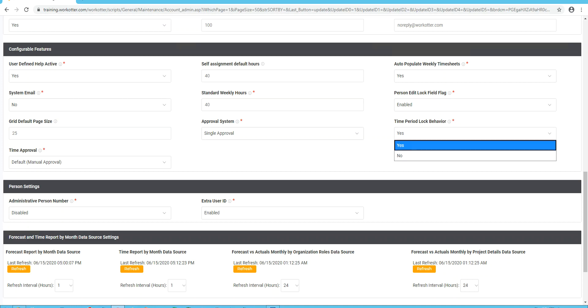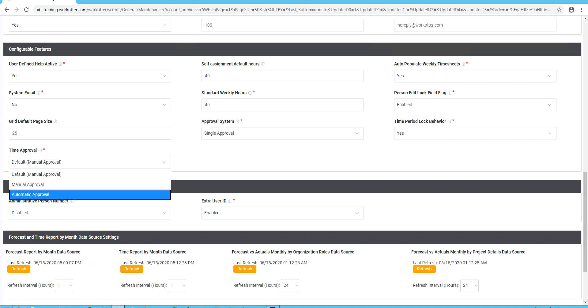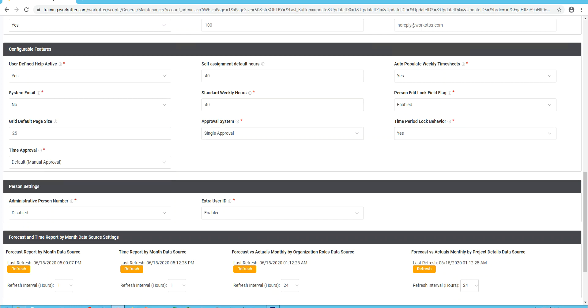Time approval is what, by default, is your time approval strategy. So manual approval means wait for someone to have their time approved, and that's the default, and we recommend it. Automatic approval means anyone who submits their time, it's automatically approved, and only by exception would you reject the time. We have additional features, though, where you can set it to manual approval and override it and make it automatic approval. For example, some of our clients have employees as automatic approval, but their contractors and folks like that have to have their time manually approved for the invoicing. It's just an example. So we recommend you leaving it as default.